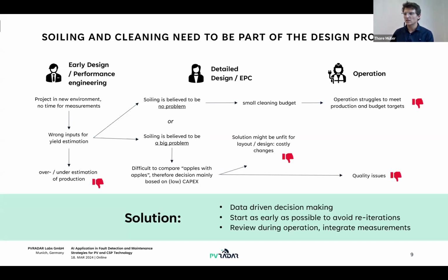The solution is to incorporate data as early as possible, and then therefore be able to make data-driven decisions. Again, I know I repeat myself, but it's something that I learned the hard way. It's important to start as early as possible to avoid very costly reiterations. The later the design needs to be changed, the more costly it is. And once it's in operation, changes, even adding a cleaning system, might be very difficult.